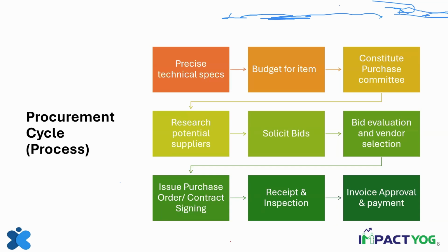Okay. So if I want to buy a laptop, maybe an HP Pavilion laptop, then the HP Pavilion laptop will have standard terms and conditions. It will have standard conditions in relation to GST. It will have standard conditions in terms of installation, in terms of packing, in terms of delivery, all that. Now, what will you do? Will you do a purchase order? Will you do a contract? You will do a purchase order because you have a standard template for making your purchase.